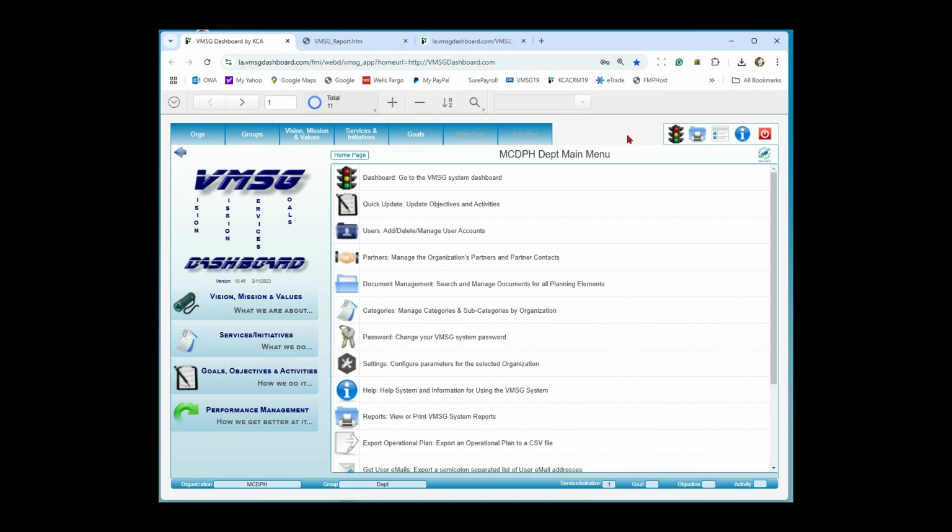Now, if you have a specific group that you want to export, I would go back and a couple things. Put in the people who were involved, at the objective lead and the activity lead and team level. Put those folks in. Update the traffic lights based on, green means everything's moving along as expected. Gold means it's completed. We're done with it. Yellow would be something is getting in the way. It's slowing down. Red would be something bad happened. We stopped completely in there.